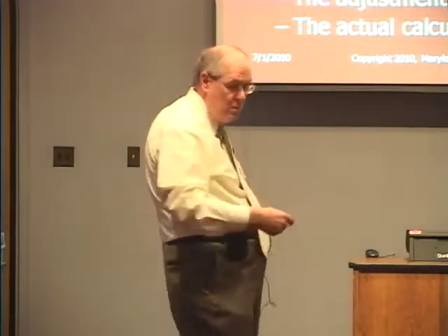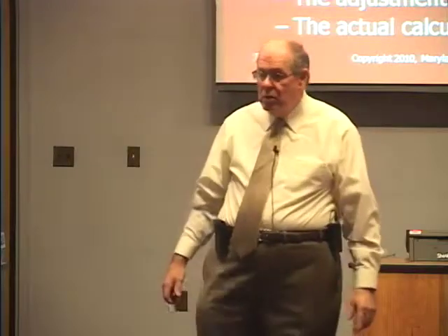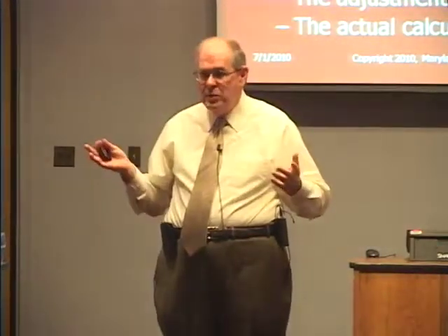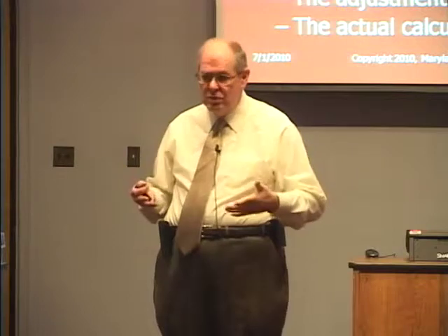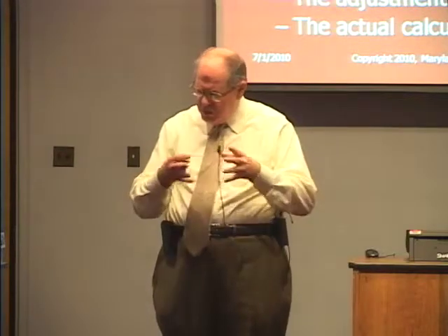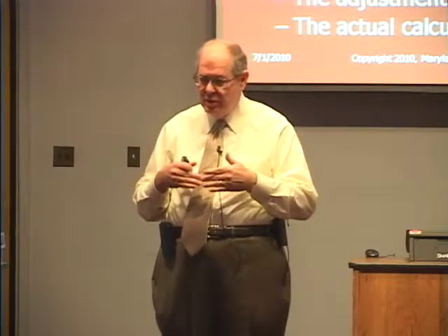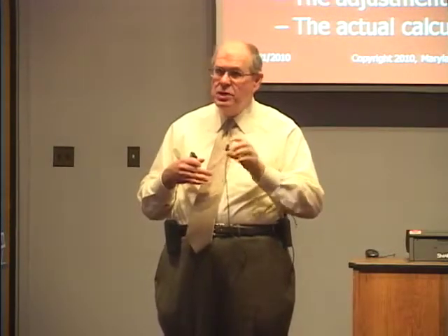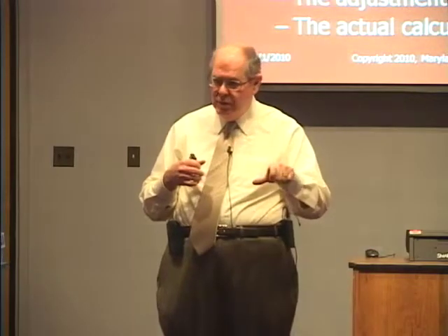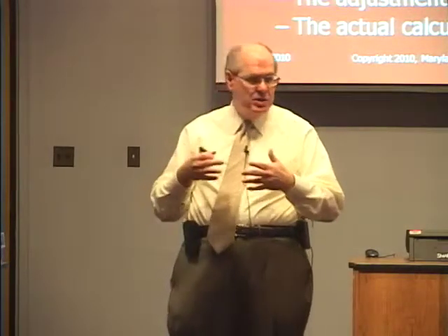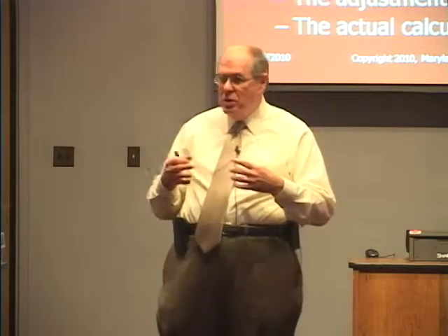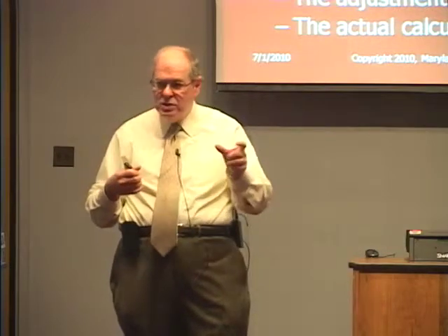So they didn't really have a number of meals in the order, because I would have thought. They had an estimate of how many meals would be served, and they had a price per meal. But the vendor submitted something that said there was, I believe, a decrease in the number of meals. They wanted to get an increase in the price per meal, and I don't know whether it was to get back to the same amount or what they intended to do, but they were using the decrease in the number of meals as a justification for the increase in the price per meal. Nothing in the contract said that that was an appropriate adjustment.